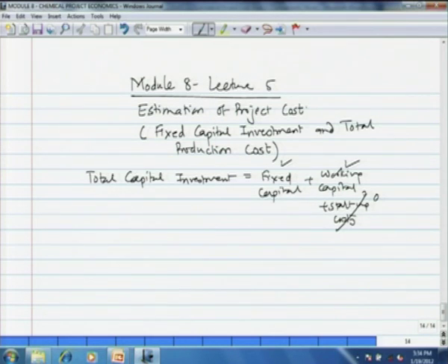So, normally this kind of capacity addition plant excludes the site preparation, and therefore, the relative cost of various components is a little bit lower, and that is why we got a large range of the cost.